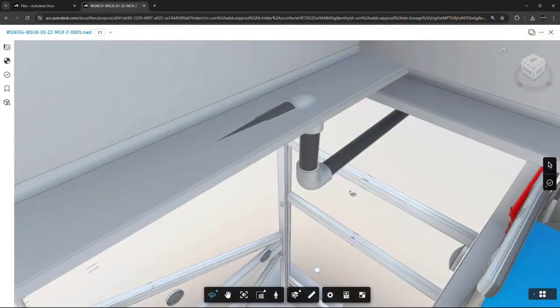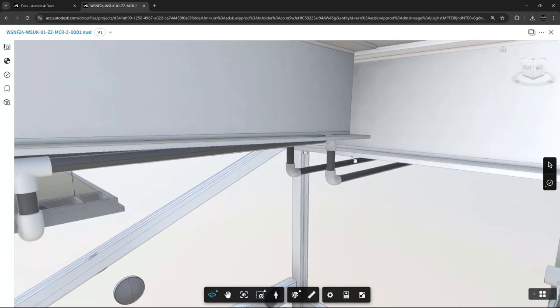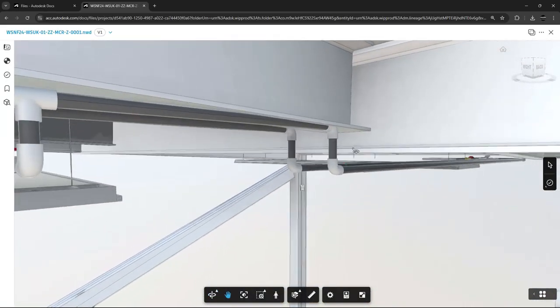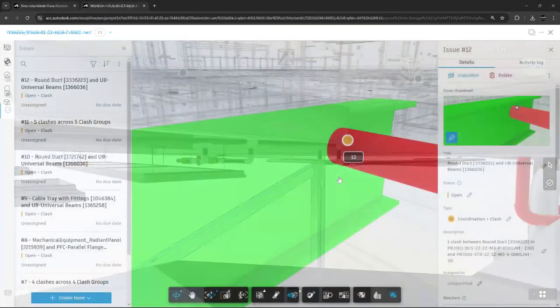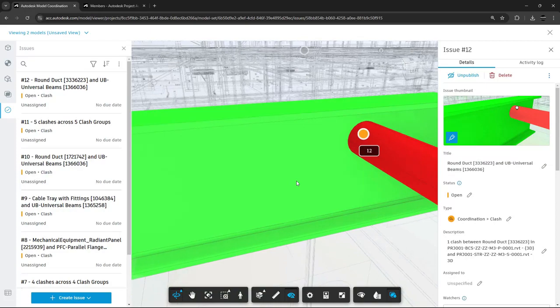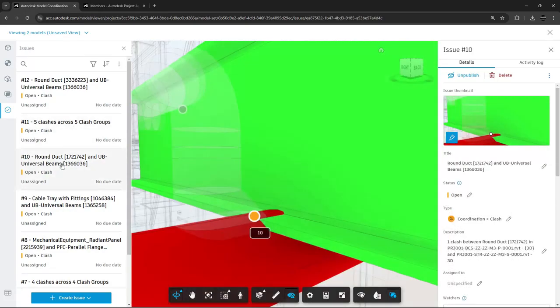In a BIM project, designers can use other disciplines' 3D models to help them design their own task, such as here, the MEP or Building Services Design team are using the structural team's model to find coordination issues, such as where the building services may clash with the structure when being constructed.